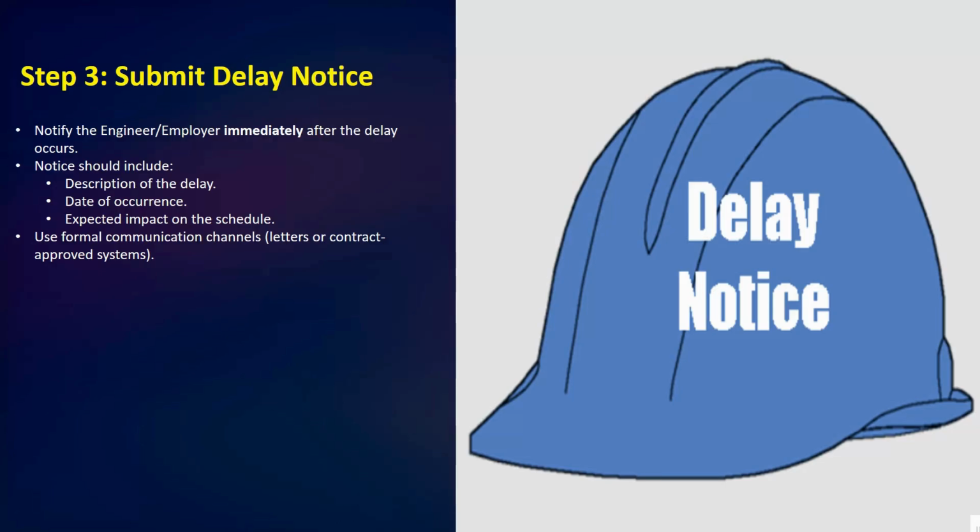Next, we have step three: submit delay notice. After identifying the delay and reviewing the contract, you must submit a delay notice immediately. The notice should include a clear description of the delay, the date of occurrence, the date when it occurred, and the expected impact on the schedule.